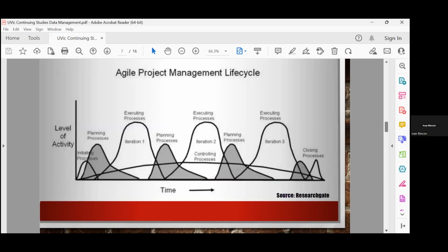So one of the biggest discussions right now in the field of project management is, okay, but there is this thing called agile. So we don't plan, we don't document, we just go and do things, right? Well, so happens that it's not true. Agile just means that you do what I just showed you many times in shorter cycles. But you actually do initiation, you do planning, you do execution, and you do the control, right?